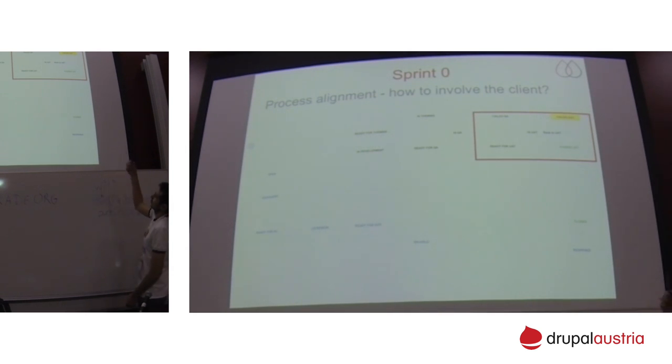And of course, if it's not, or if he has some questions or objections, he might fail the UAT ticket. Then we need to react immediately. Actually, our goal was to have all tickets in our sprint verified by the client. So far, for 11 sprints, I have never seen this happen for all of the tickets, because it's too extensive. Some of the tickets might be assigned 2 days before the sprint demo, at the end of the sprint. The client might fail some of the tickets, we might not have the time needed to close all of the bugs, and so on. So, yeah, that's the second involvement of the client.